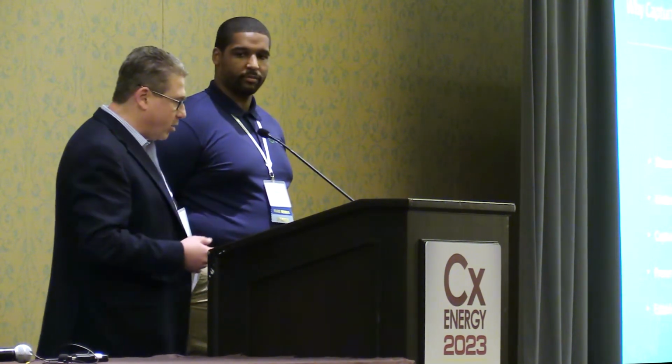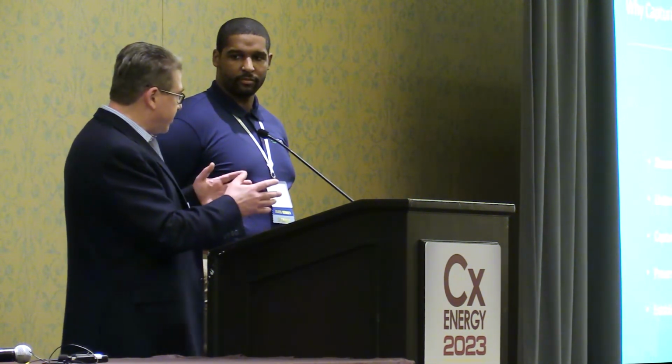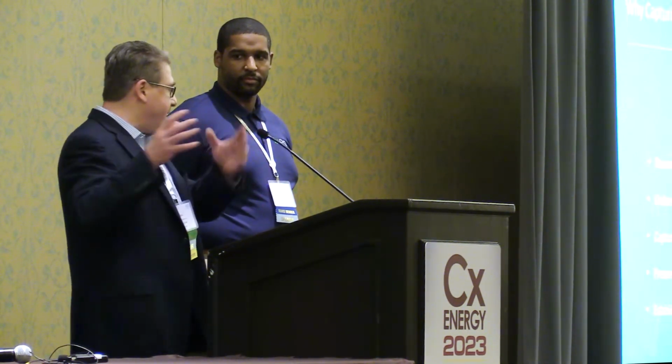For example, take a piece of equipment, a pump. Is motor frame size information required for the owner to be populated into Maximo or not? Things like this can be documented in the OPR, and that information then can be passed.